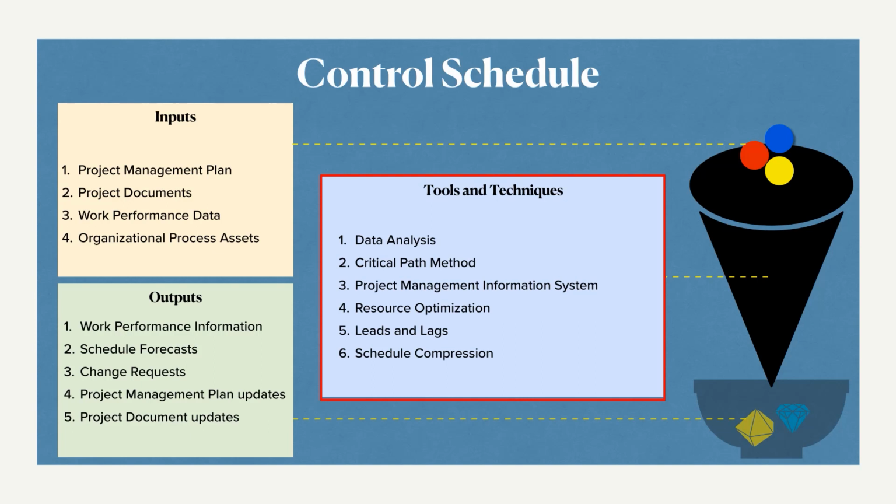All those left out backlogs, if they are not included in any of the sprints to come, will be left even at the end of the project, at the closing stage, right? At this closing stage, we cannot just close that huge list of leftover backlogs. So it is important that somebody is tracking, or there is some mechanism tracking those backlog activities. So in controlling the schedule, it is important that we look at all these backlogs. A planned versus actual timeline is again drawn for these backlogs, and it will be tracked.